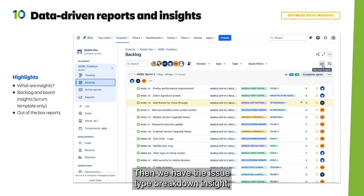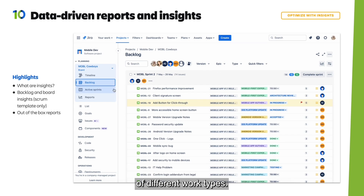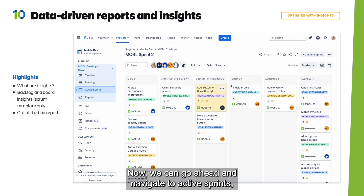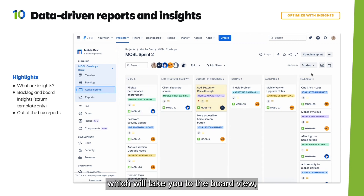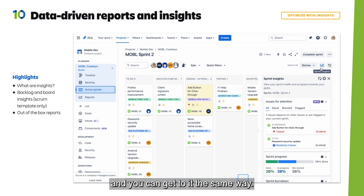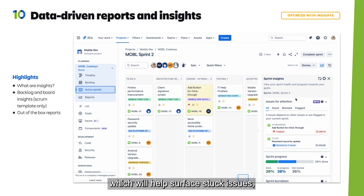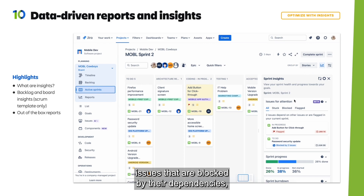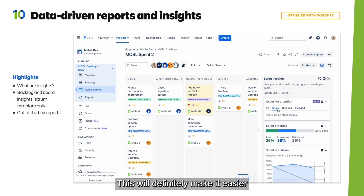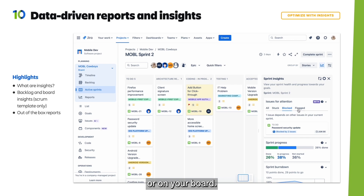Then we have the issue type breakdown insight, which helps you understand the balance of different work types. We can navigate to active sprints, which takes you to the board view so you can see board insights, accessible the same way. The issues for attention insight will help surface stuck issues, issues blocked by their dependencies, and flagged issues — making it easier to address high priority work within your current sprint or on your board.